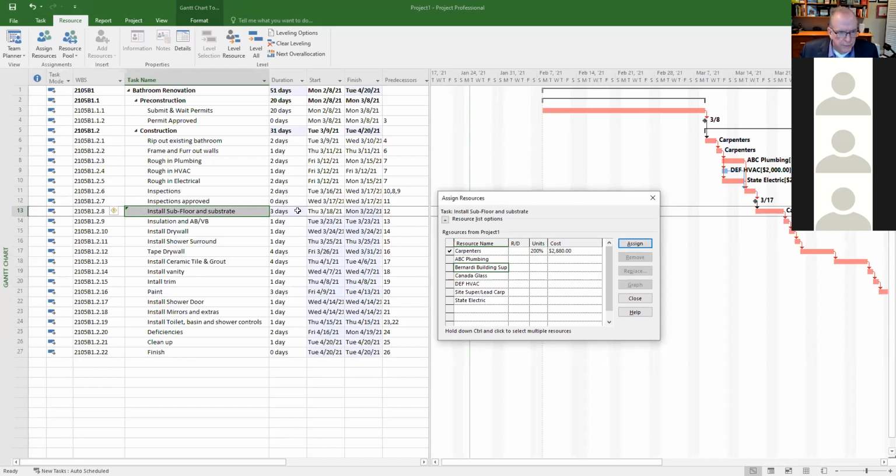Did it change? I can't remember. Yeah, it meant we went longer, right? So it was at 2 days. Now it's at 3 days. My cost did not change, right? Because I'm still saying it's going to take the same amount of hours to do it. Instead of having 3 people 2 days, I'm going to have 2 people 3 days.